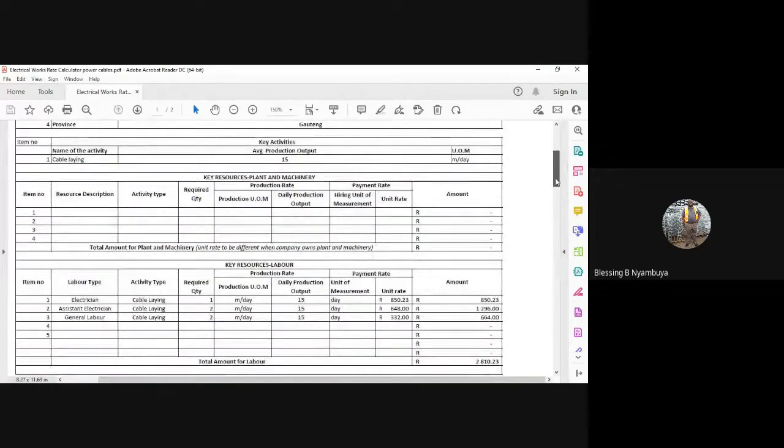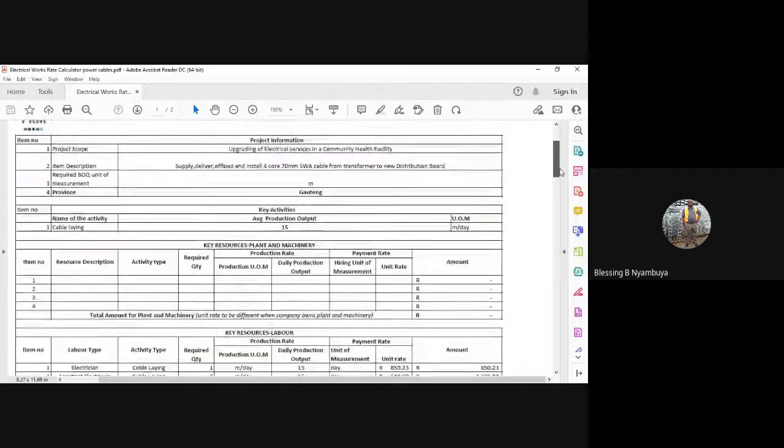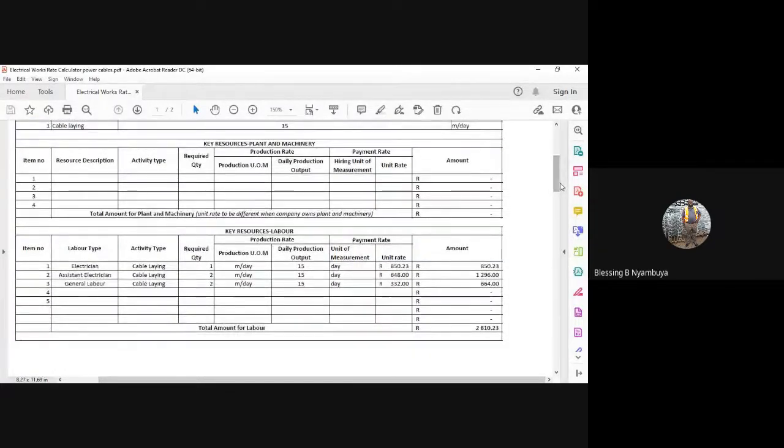So key to that was I did speak to the people who are actually doing the work as I was pricing my work. But now, if that changes to say 1,000 meters, then they will tell me, no, we cannot. We would need a crane, we would need this and that. So I have to filter in my machinery and plant resources in that trade. But in this case, they told me we don't need it, right?